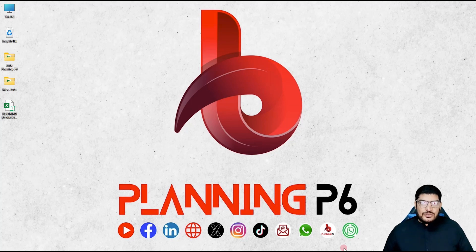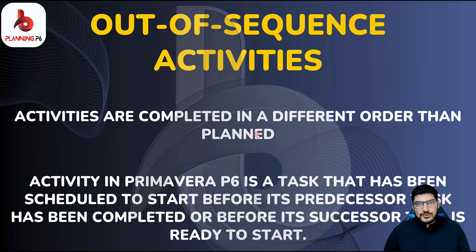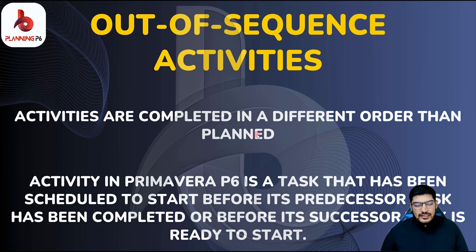Out-of-sequence activities are activities completed in a different order than planned. This is a short and true definition — you are planning activities to be completed after the predecessor, but somehow they come out of sequence and the logic goes wrong. A more detailed definition is that an activity in Primavera P6 is a task that has been scheduled to start before its predecessor has been completed or before its successor is ready to start.